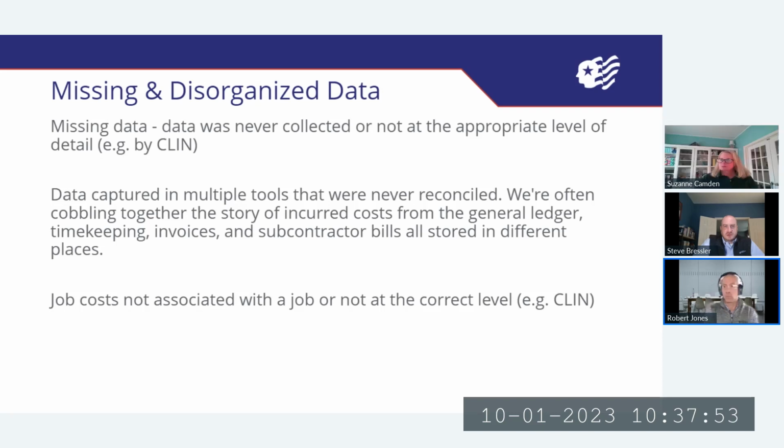We've actually also seen where the information was collected incorrectly in the job status report, but the person creating the invoice found the issue, actually created a correct invoice in wide area workflow, but the job detail information that was provided for the incurred cost proposal didn't match. And so DCAA said, wait a minute, you build this structure over here, but you're claiming a different structure in the incurred cost proposal. So we have to be very careful about those discrepancies.